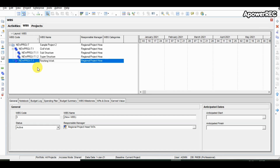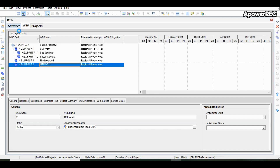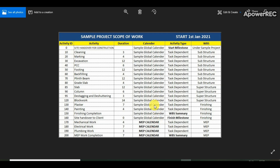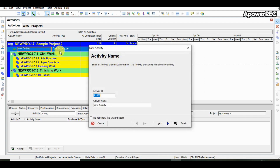The last WBS — finishing — has now been defined, along with MEP. Once we define all the WBS major work packages, the next step is to define the activities. The first activity is site handover for construction, and its WBS is the project itself. We will select the project and click on the add sign to define the new activity.